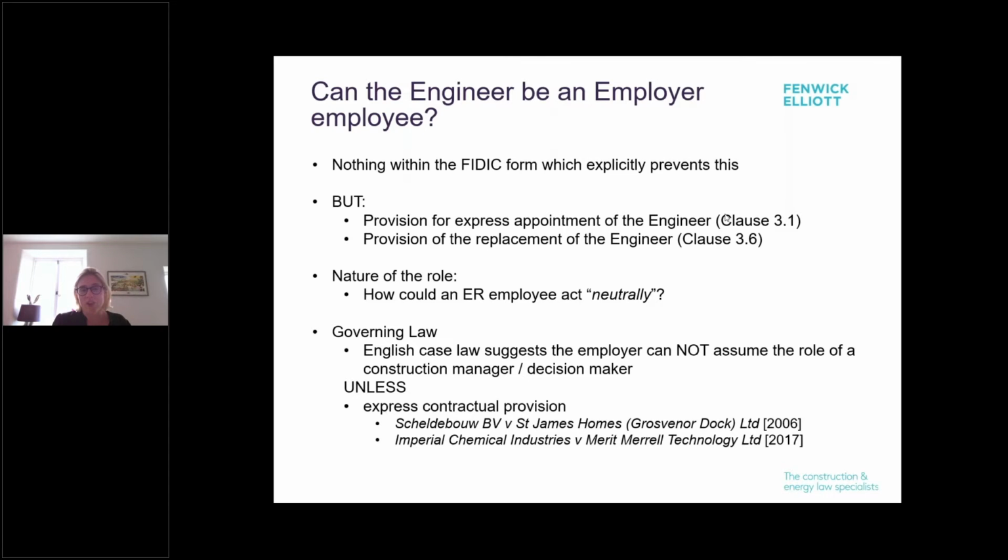So this was a very interesting question that was submitted in advance. Can the engineer be an employer's employee? There's nothing expressly within the FIDIC form that explicitly prevents this, but it doesn't sit well with how it's drafted or with the governing law if the governing law is English law. There's provision for express appointment of the engineer. Would you need to do this if it was just an employee? Provision for the replacement of the engineer as well in clause 3.6.